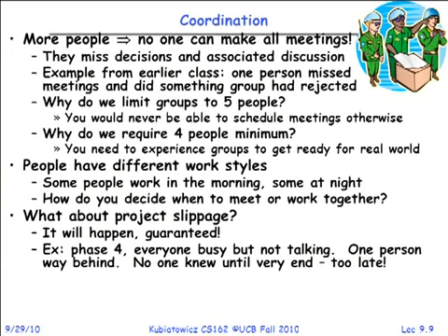Communicate. Talk often. Why is this under coordination right after communication? You've got to keep reevaluating. It's very easy in a group to fall into this, okay, we've got a week, we'll see you guys in 4 days. You know, we'll find out what happens. Well, the problem is 4 days is probably too late. So you should plan on meeting a couple times a week to figure out what's going on. You could be very 2010s about it and have conference calls using your cell phones. I don't know. But try to have some communication much more frequently than twice a project.